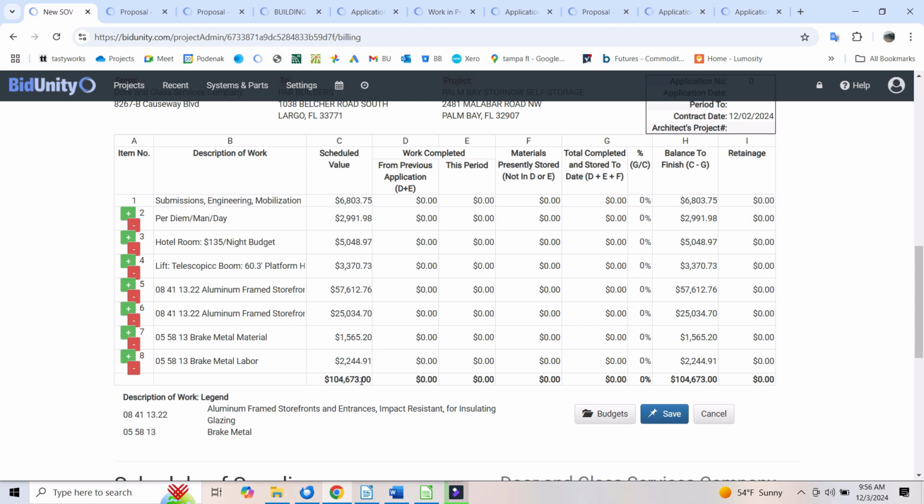I mean, we're going to spend probably $80,000 performing this job. Would you lay out $80,000 and then say, please pay me? It's not a reasonable way. And that's why the industry has gravitated toward breaking down the contract price into the incremental steps or things which occur from the beginning to the end of the project.